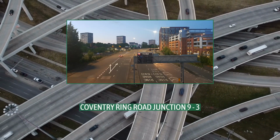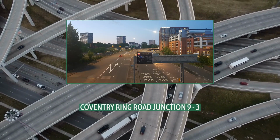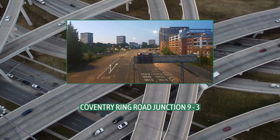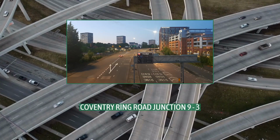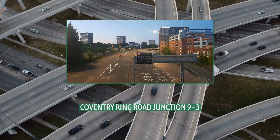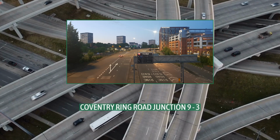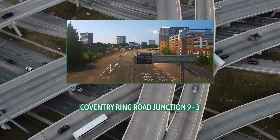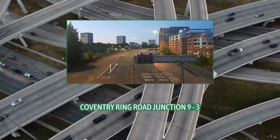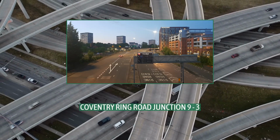Dorman, Long & Co. erected the steel supports for the flyover, and McKinney Foundations the piling, with the main carriageway work carried out initially by local firm G.R. Yeomans. But in December 1963, the city engineer, Granville Berry, ended Yeoman's contract, citing a lack of progress, poor workmanship, and the company's financial health as reasons. Galliford & Sons took over to complete the remainder of the work.